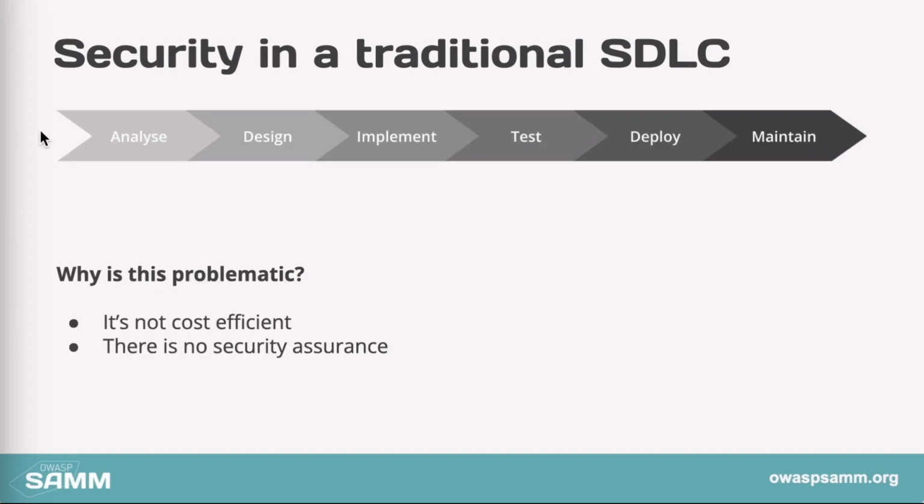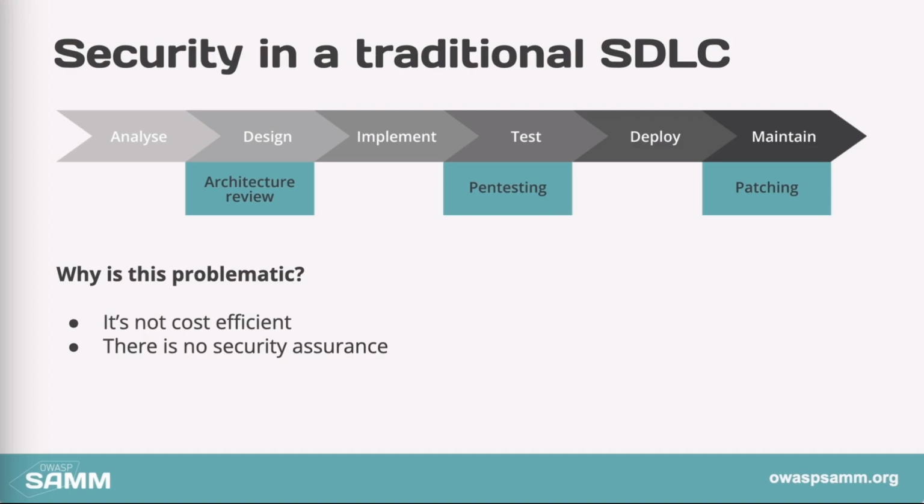Now, typically you will have some phase gates in the traditional SDLC. For instance, an architectural review, although this is less widespread. Pen testing is the next time you think about security, at which point the typical experience is we've waited 3 weeks before go live to start a pen test. The report arrived on Friday before go live and reported 6 vulnerabilities. The project lead still insists on going live on Tuesday, the next week. And then the whole fight begins and the security team gets blamed.